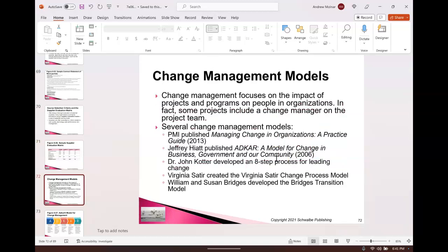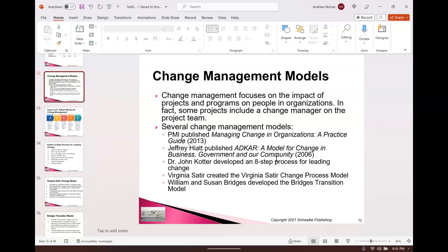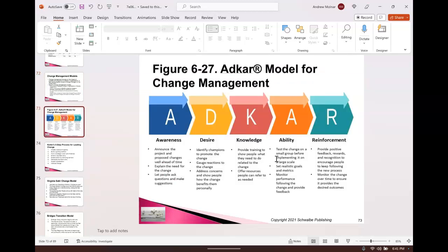One of the things that we take for granted in project management is that we've established with our project team a great change management process. But contracts are different, so you always want to work a detailed change management model into your contract, because you can expect changes, but it's a contract. People are going to argue over it. So work the change management model into your procurement effort, okay?